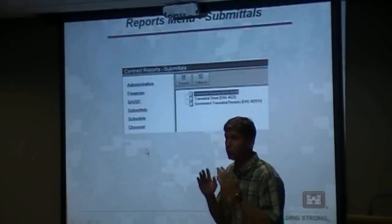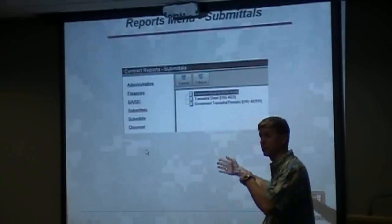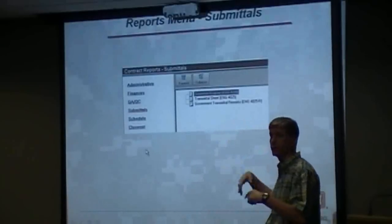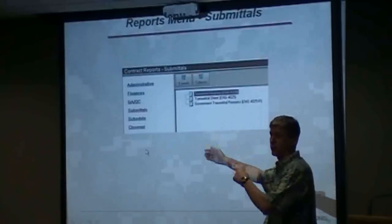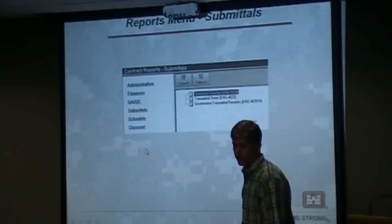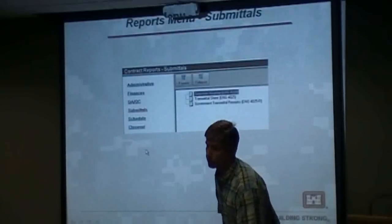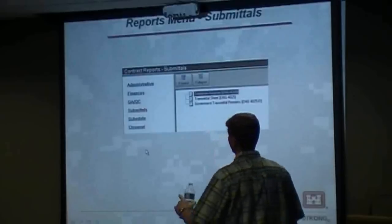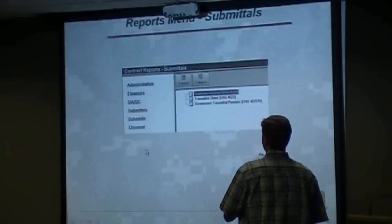Unless you break them down into specific areas, then you might link them to the appropriate activity. Most of the submittal stuff should be done before the first activity starts.